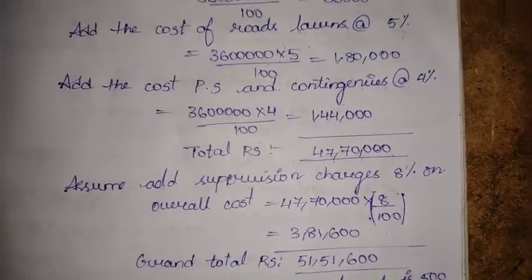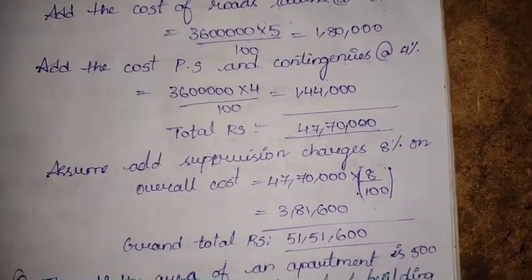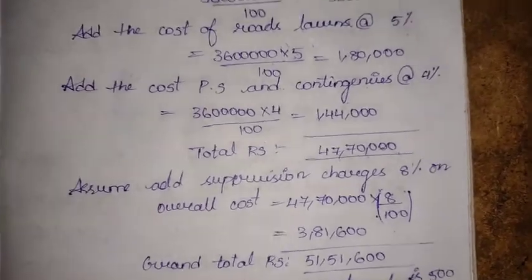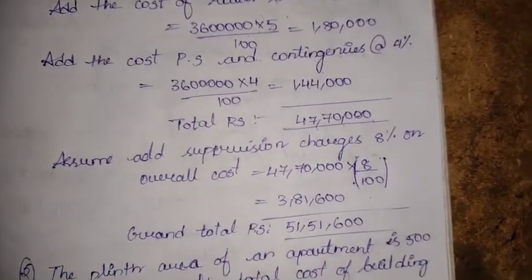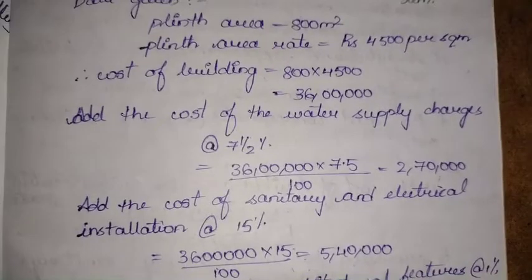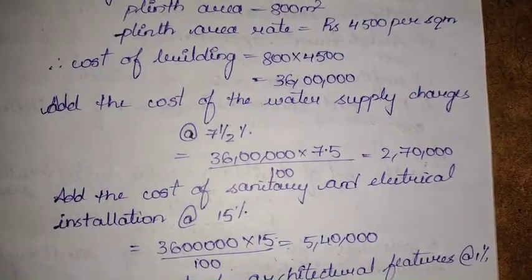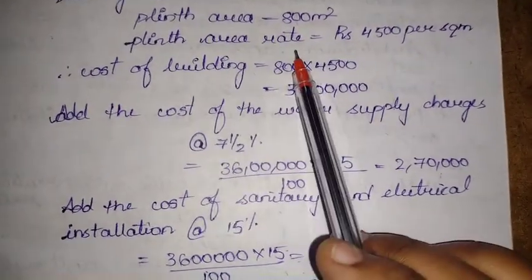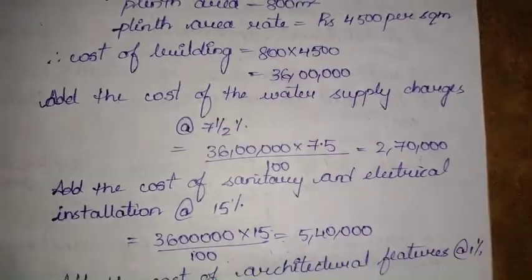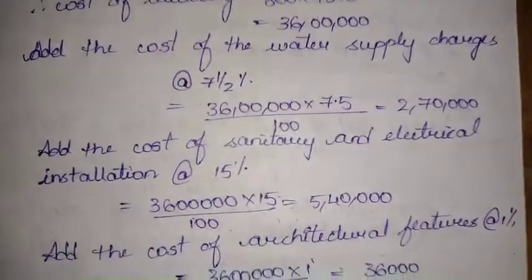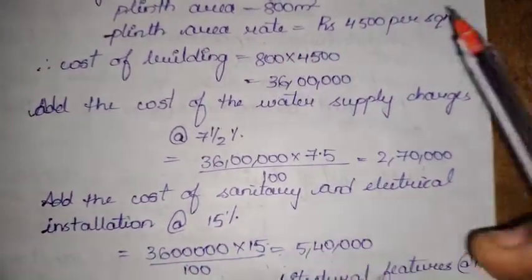We are done with the first example. In the plinth area method, to get the cost of a building we multiply the plinth area by the plinth area rate. The plinth area rate is obtained by taking a similar structure in the same locality with similar specifications. If you haven't watched that video please check it out.